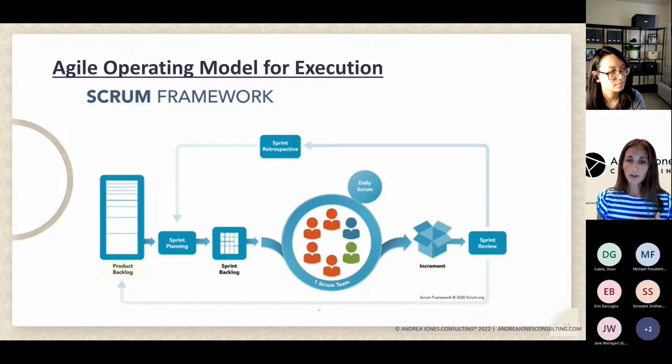So they'll do that review, and then you can see it kind of going around to a retrospective, and I'll ask Grace to chime in at the retrospective. But what I appreciated about that is, you kick the managers out. Now it's just the team, the sprint team who works. And the Agile project manager will ask, hey, what did we do well this time around? And how can we improve? And it's about the process. It's not about an individual person, right? It's what can we do better?